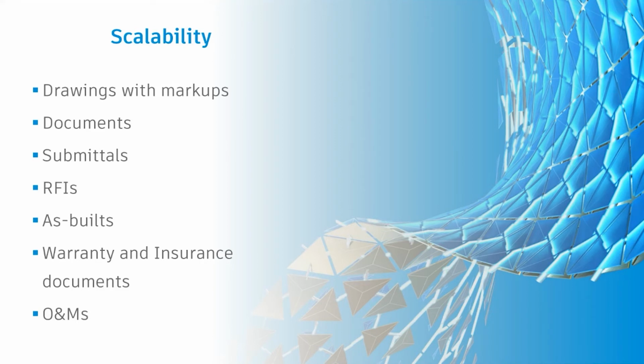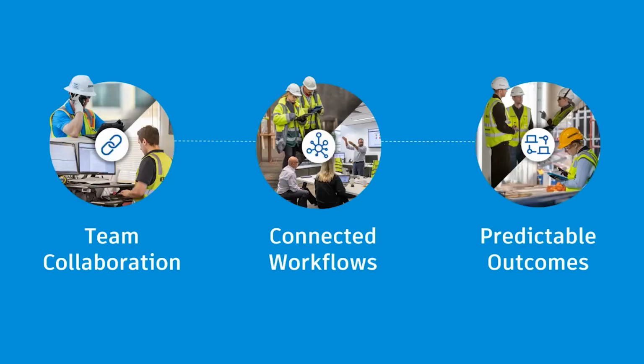And on top of that, the importance of that information is that it's not an on-off switch. If a contractor tells you, yeah, we'll give you a facility management model at the end, it's not that easy. There's more of a scale, I call it a 100% scale, from that delivery of just coordination at 25% to an actual integrated interactive FM model at the end, which is 100%. So it varies in between, and you really have to understand that you have to be dedicated from the beginning so you get the scalability and the benefits as it moves forward.